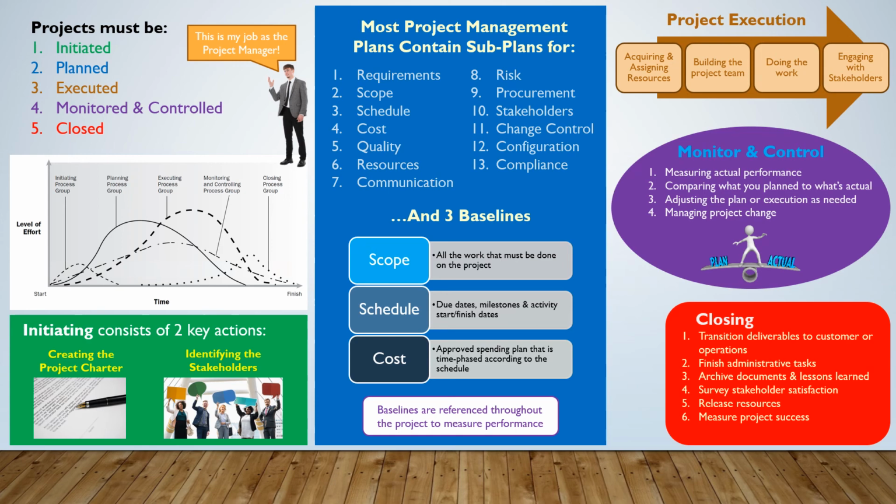We want to measure project success. So we want to compare all the project outcomes all the way back to the high-level objectives in the project charter and make sure we met those. How close did we come to meeting the project objectives in the charter? And lastly, we need to prepare and deliver a final report. And this usually would be the project manager briefing senior management or the client on all of the outcomes for the project. How do we do in all the different areas of scope, schedule, cost, quality, risk, resources? And we basically want to review that with all of those senior people so that they know what happened and we can learn from it as we move into other projects.